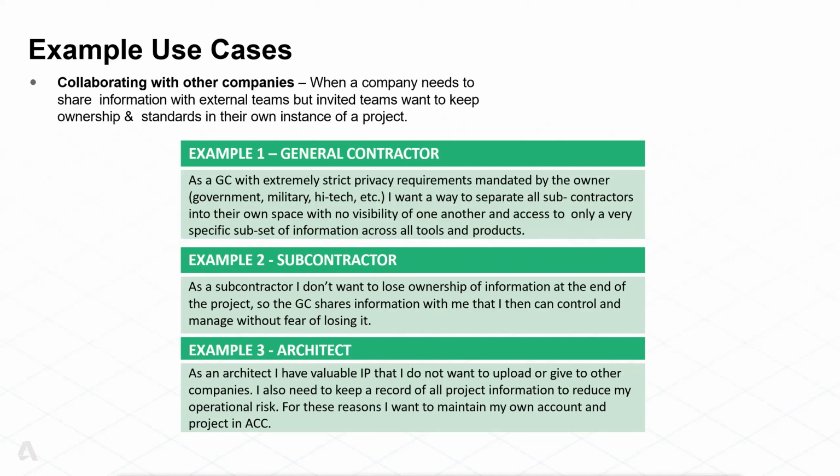Example number 2 would be you're a subcontractor and you want to make sure that you have access to all of your documentation once the project ends. By using Bridge, the GC can share relevant project files and relevant sheets with your account site, ensuring that you will continue to have access to that once the project is closed out, if you ever need to go back and access that information.